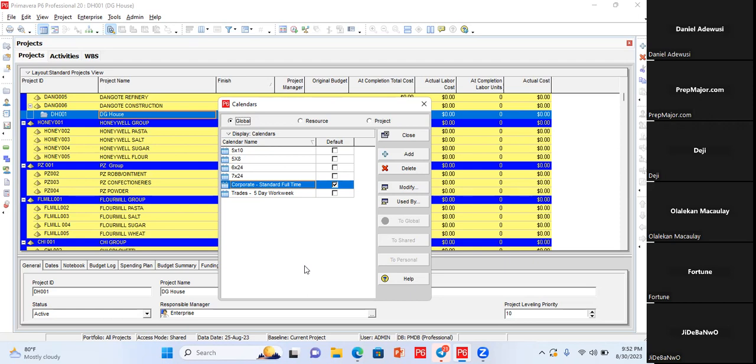Yes, it does. They can do that, if they want to really monitor your man hours to get what they call productivity, how productive you are. Because when you say somebody has a capacity of 8 hours a day, it doesn't mean his productivity per day is 8 hours. Because he will go and smoke, he will go to the toilet. These are not billable hours.